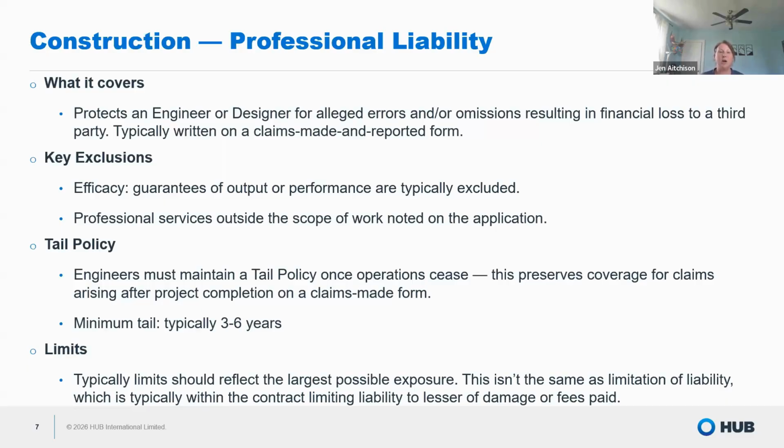So if you have a structural engineer who comes out and does a structural review and you pay, say, 7,500 bucks for that structural stamp, structural drawing, and then it turns out that that structural was incorrect, if they're only responsible or liable for $7,500 and you've got a building collapse or it's a ground mount and the solar farm itself collapses under the weight of ice and snow because it was designed wrong, the limits matching the fees paid would never work. So typically we're seeing things in the neighborhood of 2 to 5 million on the average rooftop